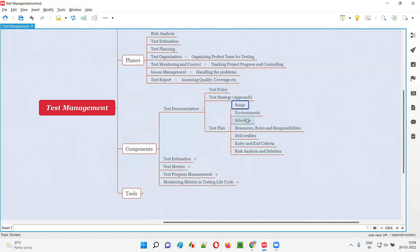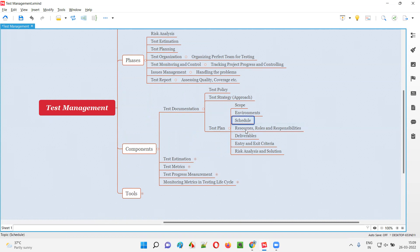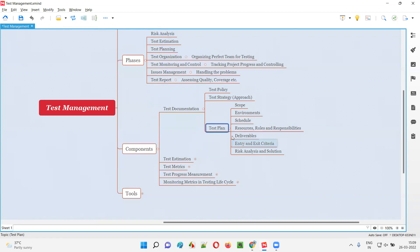The test plan contains a lot of things: scope of the project, what needs to be tested, in which environments we have to perform testing, schedule — at what time we will perform which type of testing — and whatever testing activities we perform based on time and schedule. Resources — who are going to work on this project, their roles and responsibilities — everything will be written in the test plan. Deliverables — what you are going to deliver as part of the project, and what is the entry and exit criteria for software testing.